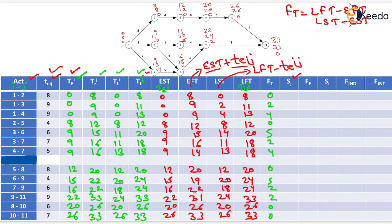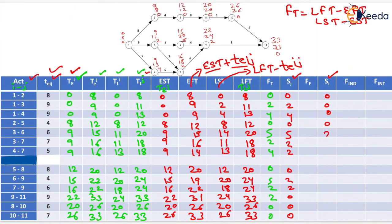We fill the slack of the j-th event: event 2 = 0, event 3 = 2, then 4, 0, 5, 2, 2, 0, 2, 2, 0, 0, and event 11 = 0. For slack of the i-th event: event 1 = 0 (three rows), event 2 = 0, event 3 = 2 (two rows), event 4 = 4, event 5 = 0, event 6 = 5, event 7 = 2, event 9 = 2, event 8 = 0, event 10 = 0.